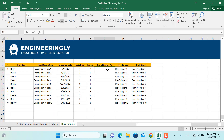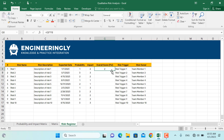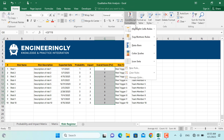I'll write an equal sign, then multiply probability times impact times the score value, and press Enter. I'll apply this formula to all of the cells in the risk register. Lastly, we are going to color code these values.